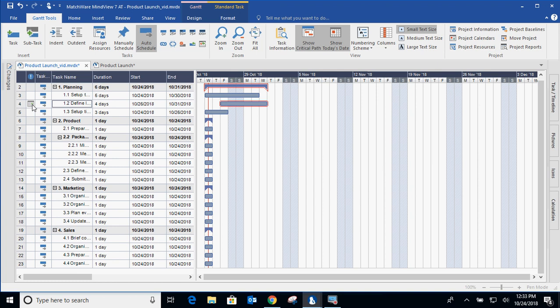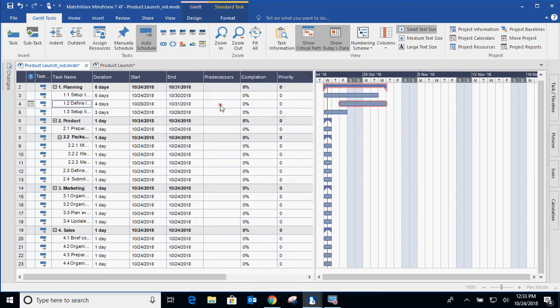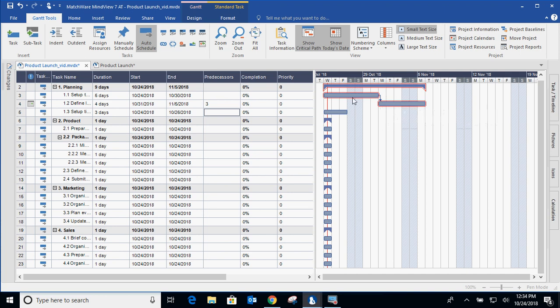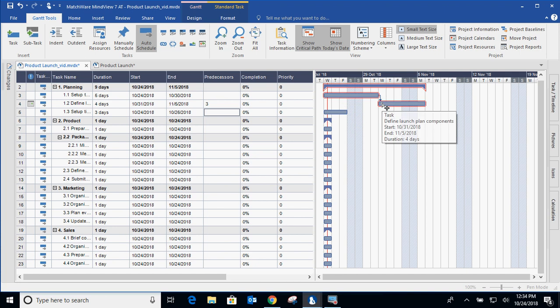You can also get into dependencies. And everything that you do on the left side of the Gantt chart, you can also do on the right side. So if I want to expand this and I want to create a predecessor on number three, it will create a dependency. So what this is saying to the project manager is that setup team has to be completed before we start define launch plan component.